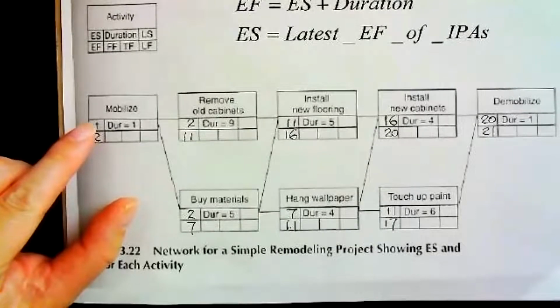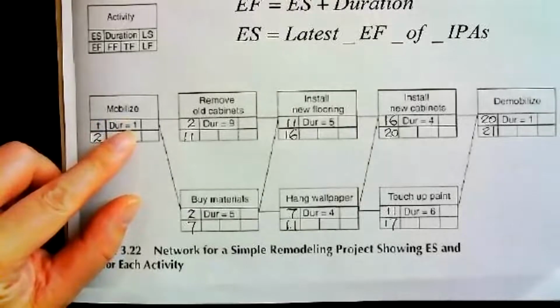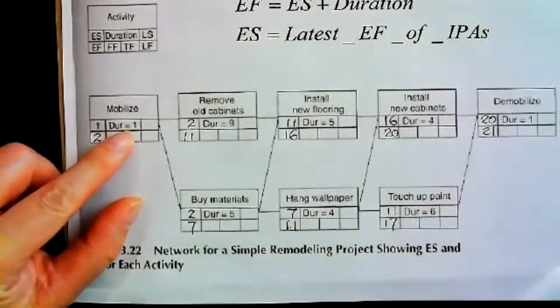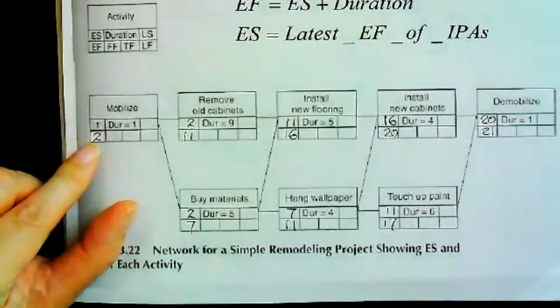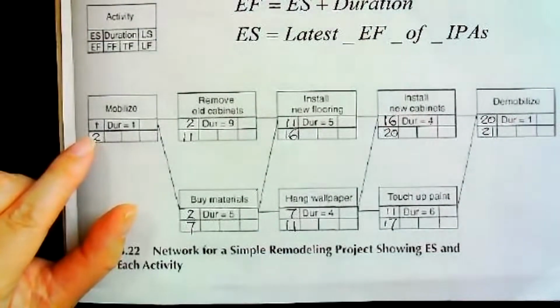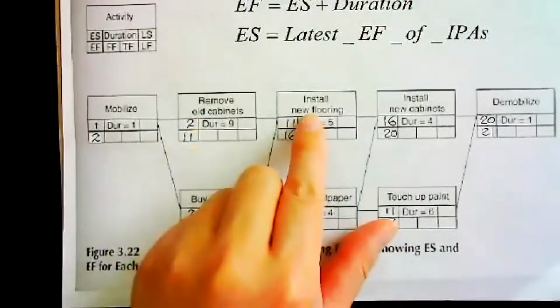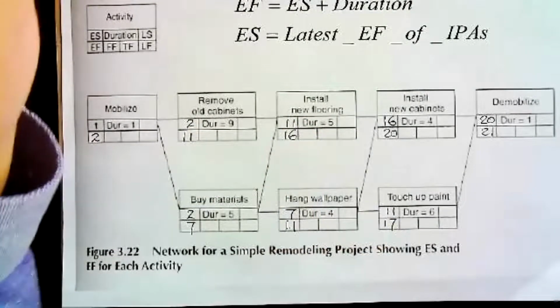Early morning. It uses 1 day to finish, so it actually starts in the morning and I finish it in the evening. But here I use 2. That means this is the early morning of day 2. This one is already finished. You understand? So all the times I marked over here are morning time spots.